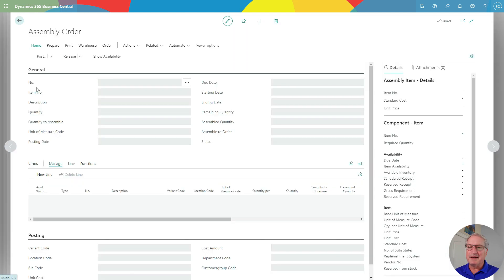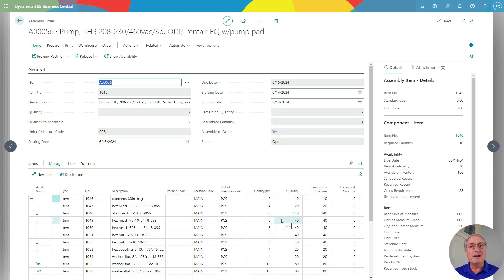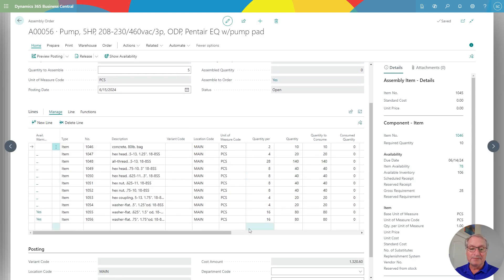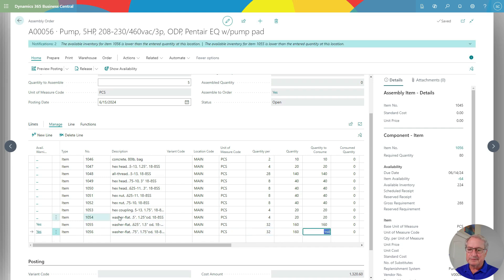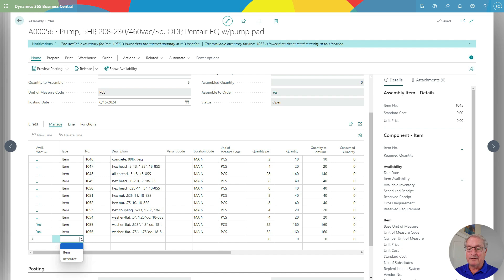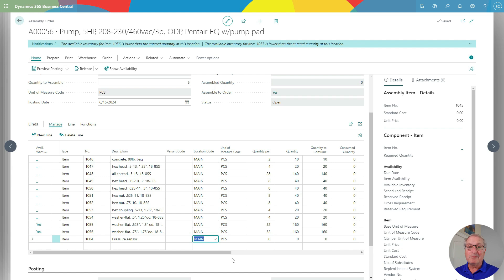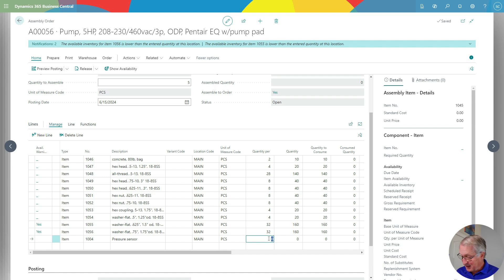The second order here — this is the same standard assembly, but what I can do is I can change it. For example, I can change the quantity of the component items here. I can also add an item or take an item out if I want to. I've got this item from my inventory and I'm going to add it to this particular assembly, so it will be a new version of this assembly that I'm going to include in the project. I'm going to add four per unit — I've got five of these units. I'm going to save this. It's going to be a different assembly and it's going to have a different cost.